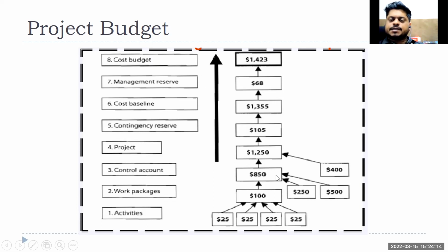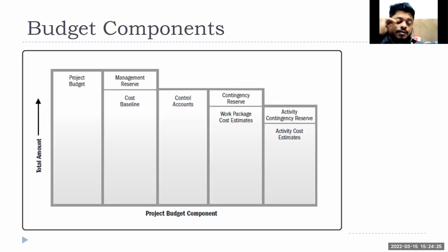And again, this needs to be put in a schedule, right? Each month, each week, or each quarter, what is the total requirement of money? That will be a proper cost budgeting, right? So we start with again the same graph.